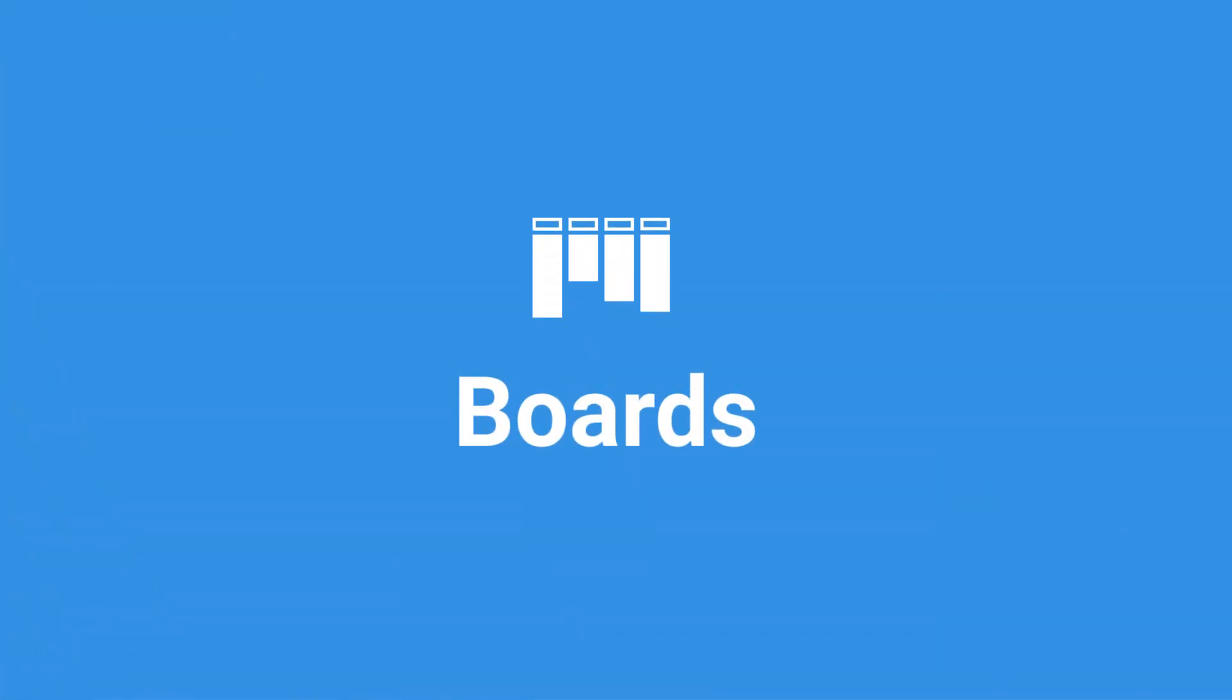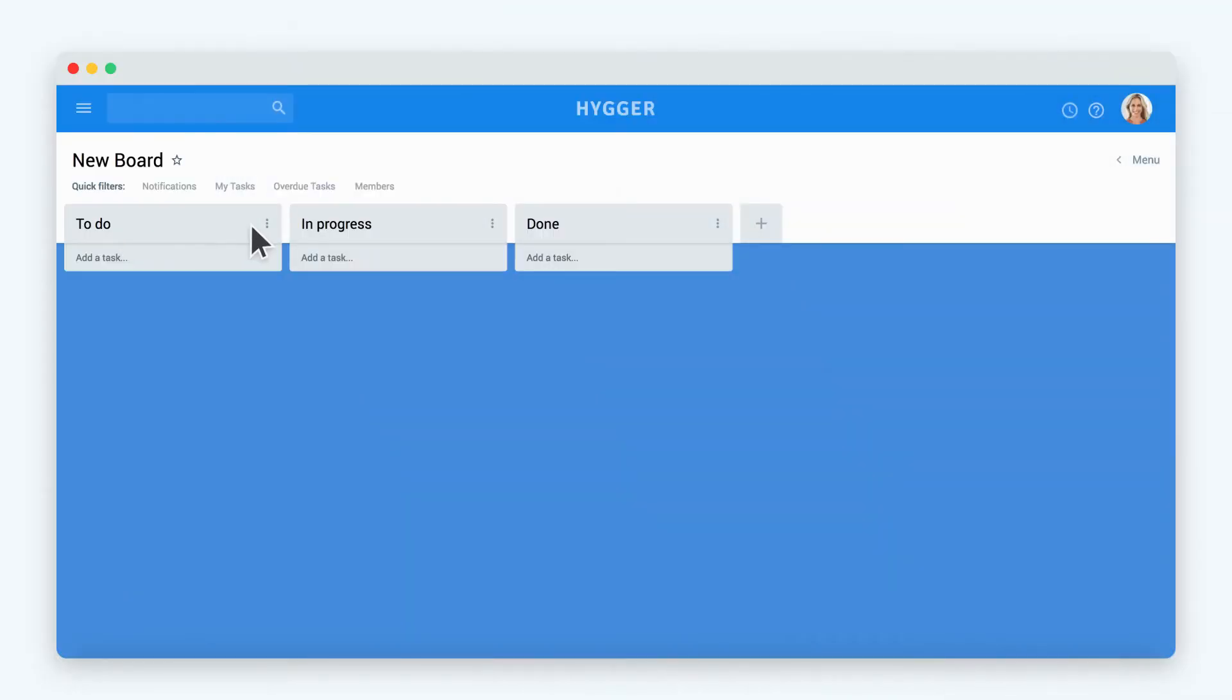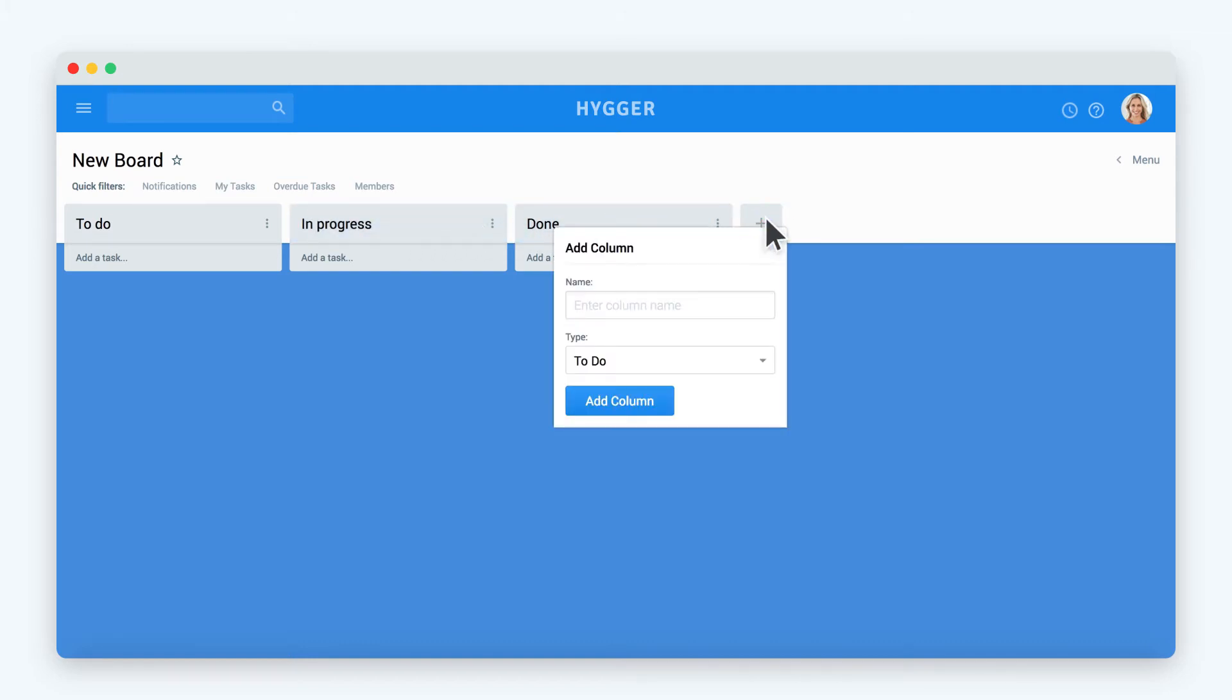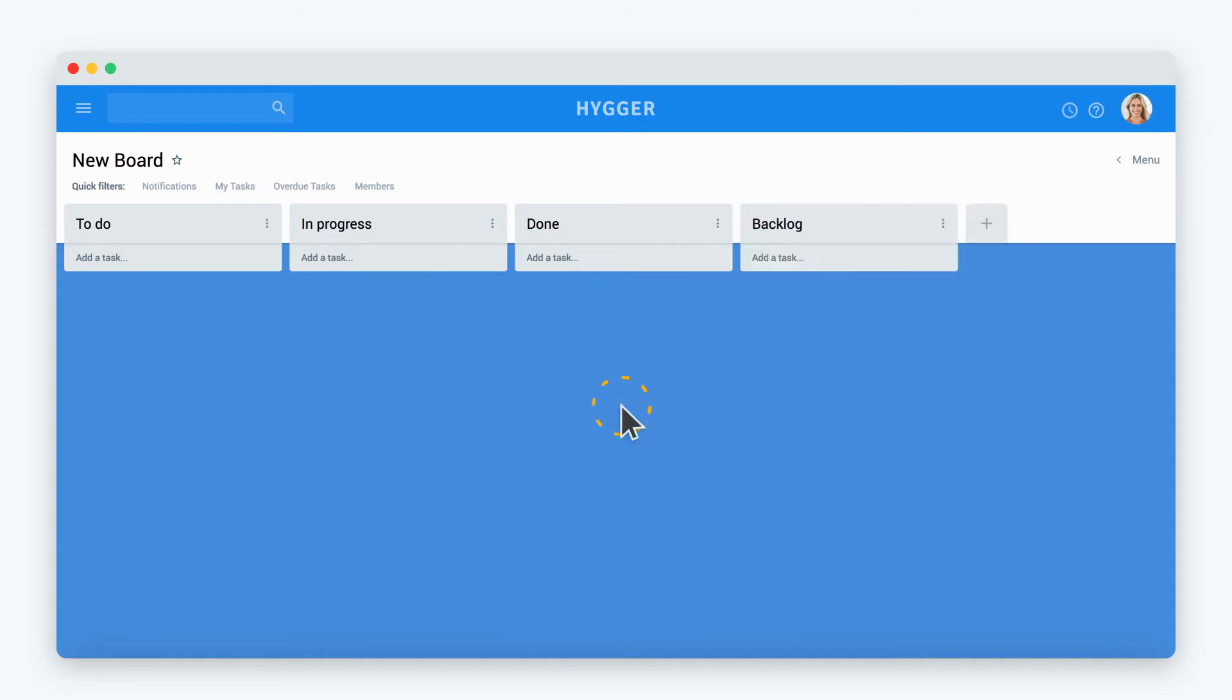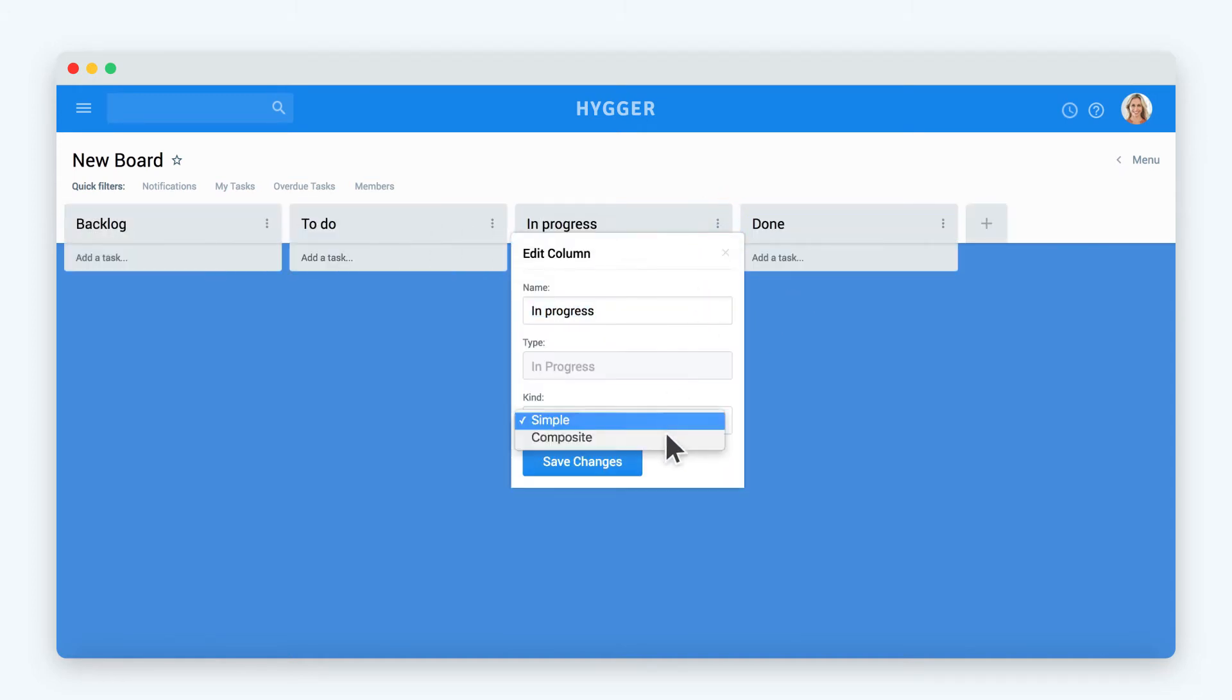Now let's take a closer look at the main board elements. Let's set up a simple board workflow. There are three types of columns on the board: To do for the tasks to be fulfilled, In progress for the tasks that are already being worked on, and Done for completed tasks. By using these column types, you can track task lifecycle across all your projects.